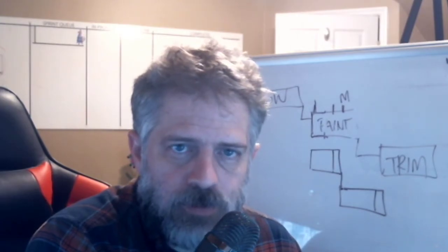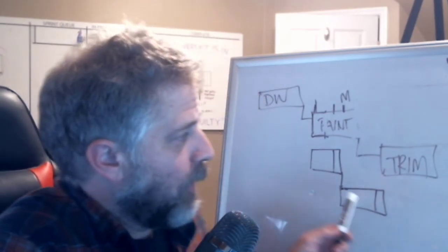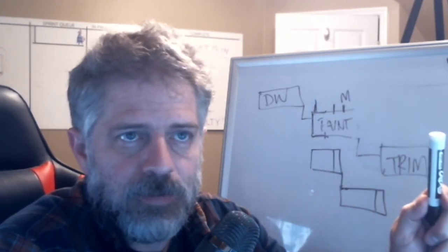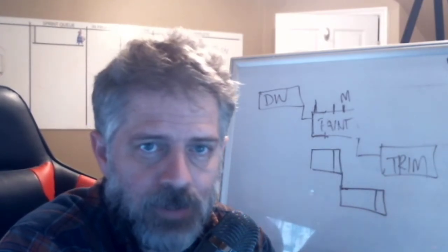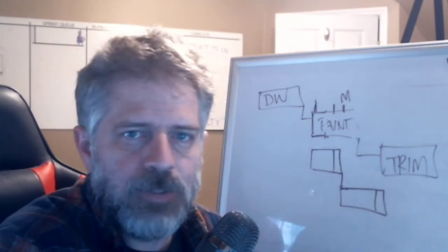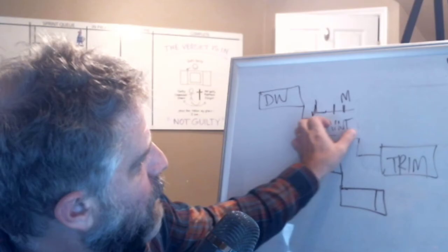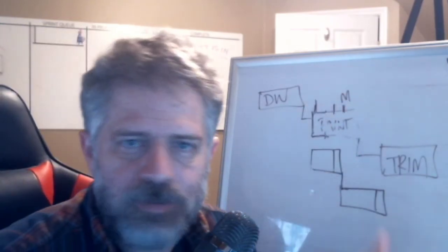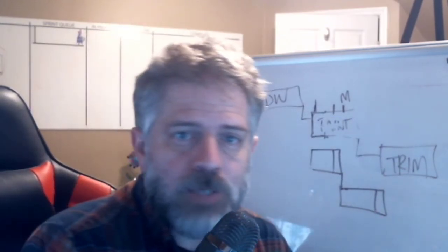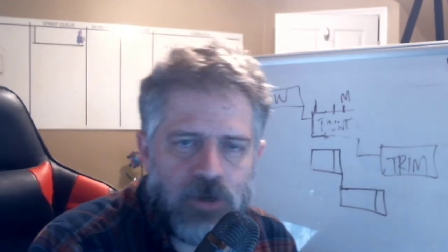between all the stakeholders, and then you identify how you're watching that margin. And this is why this scenario up here, where somebody adds margin and then the project manager adds margin, but nobody's watching the margin, and everybody knows there's a lot of slop in there. And so this 4 days right here up in this situation ends up getting pushed so often because everybody's busy and there's a lot of unknowns, gets pushed out past those 8 days. And then you run into problems, and then you're having to fix the problem with the trim carpenter and then all the subcontractors that follow.